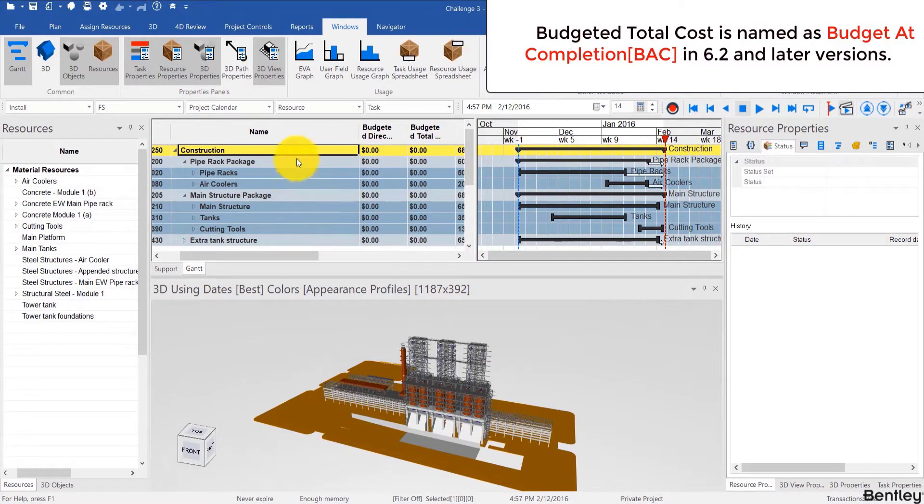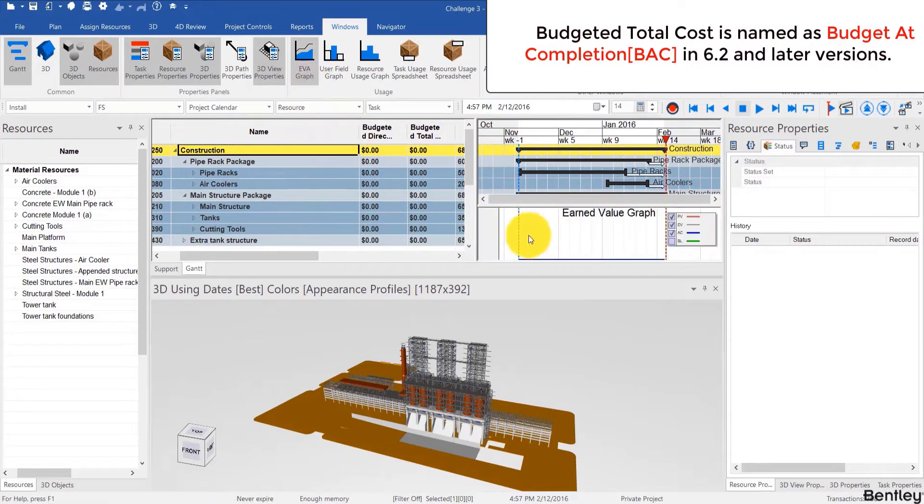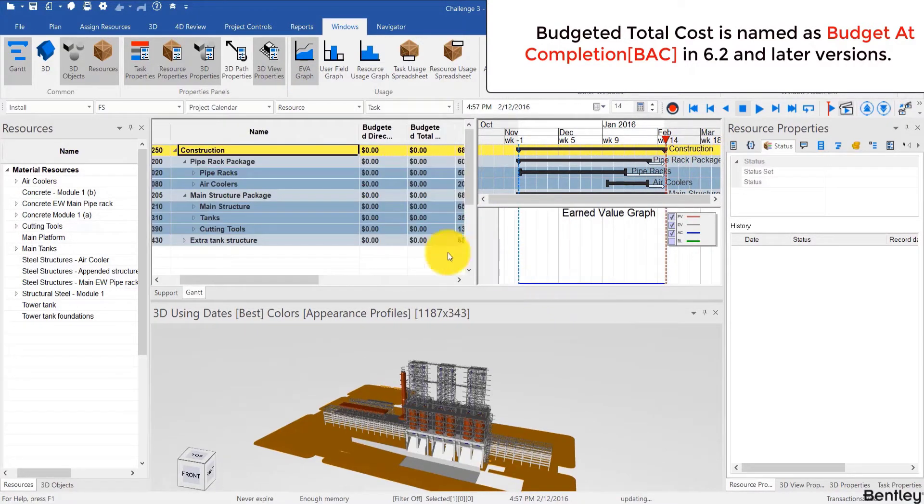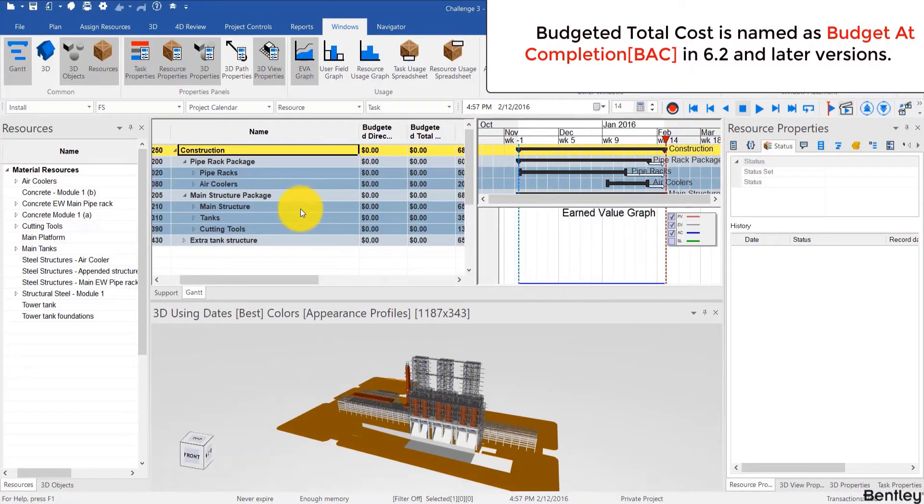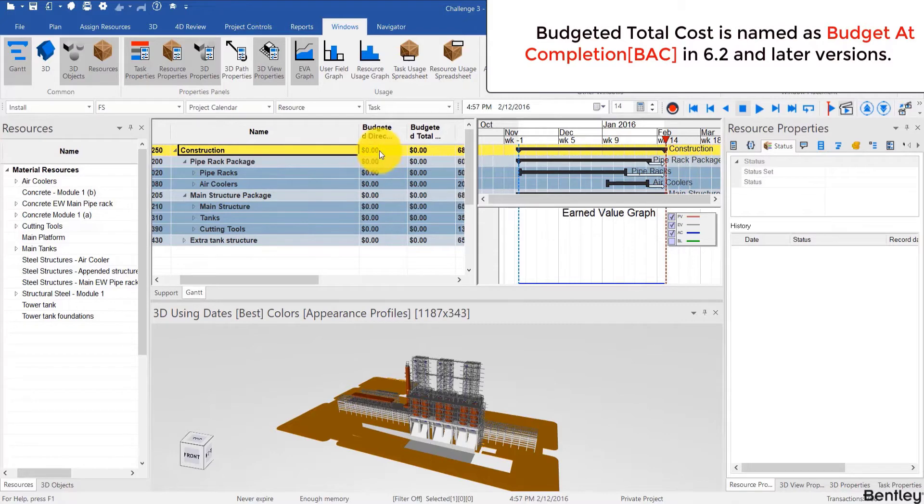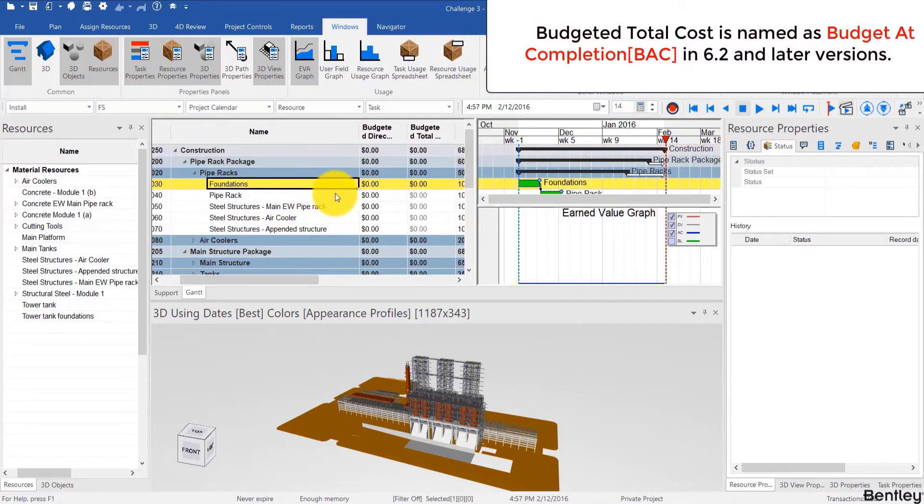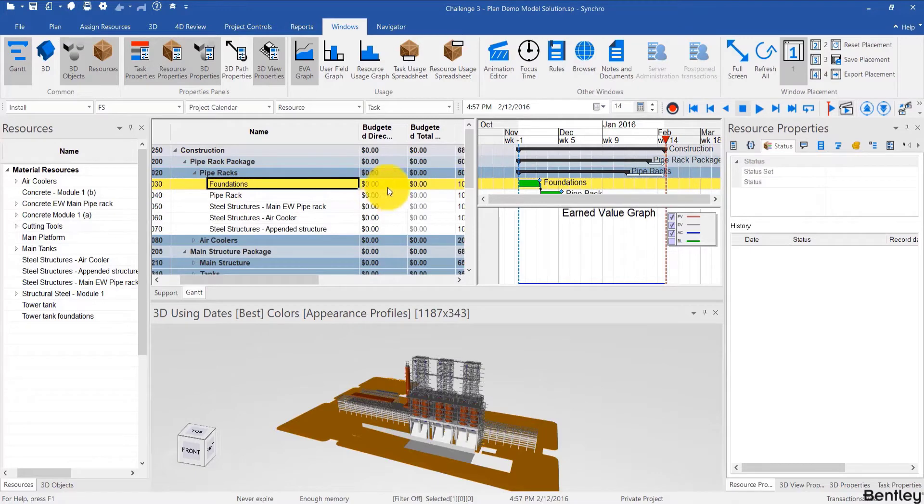Also it's a good idea to show the EVA graph although right now it's pretty empty but it will populate as we're populating costs in Synchro. Now the first and easiest way to add costs is to simply type them in the budgeted direct cost. So I'll take an example, for example foundations activity here.